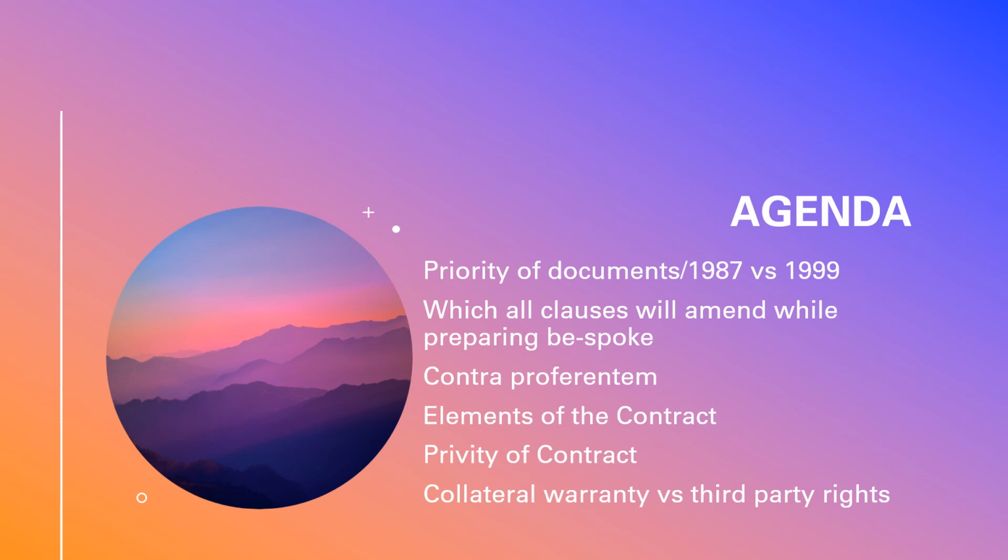At the same time, they must not contradict each other, because sometimes people change the clauses just like that, and in FIDIC all the clauses are connected. You can see the reference of clause 2.5 somewhere here, somewhere there, and reference of 13 somewhere here, somewhere there. So when you change, you ensure you change the clauses for the benefit of the employer. At the same time, you have to ensure the clauses you're changing will not contradict each other.